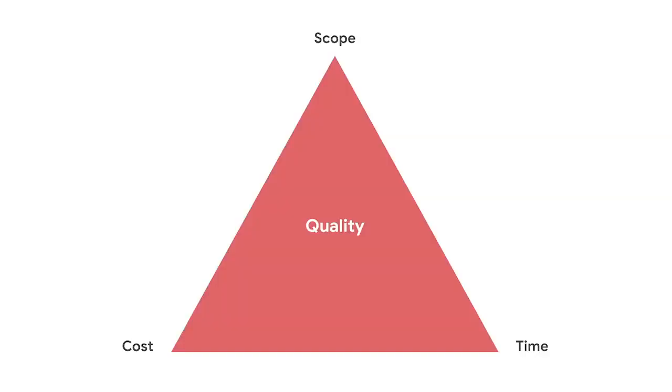If the product needs to look or function a certain way, then the requirements are a top priority, and you could negotiate aspects of the budget or timeline in order to adhere to the scope. A common tool used for determining priorities is the triple constraint model, or the iron triangle, which we covered in an earlier course. The triple constraint will help you decide if a project request is acceptable and what impact it'll